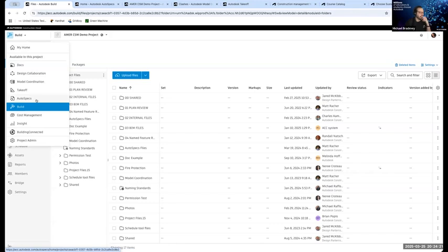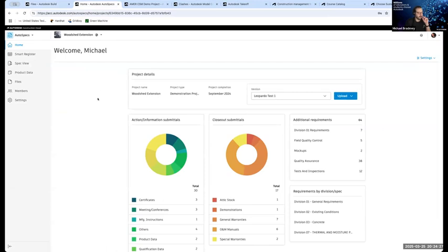We have AutoSpecs, which is really, man, I don't know if folks entering the workforce even know that this is a thing anymore, but we used to have to go through the spec book and create a submittal log and a submittal registry for a new project, and it would take like 2 weeks. You'd have a couple thousand pages of spec books, and you'd have to create all the submittal items that you had to submit to the architect and engineer. We still do that if we're not using this.